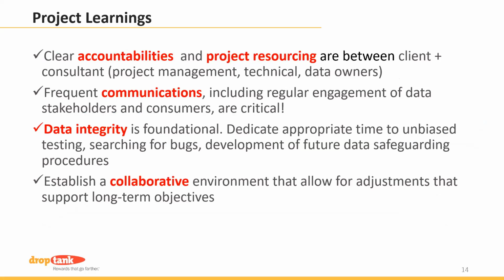Project learnings, again, it wasn't all smooth. There were some hiccups along the way. When I just reflect and give you my honest feedback here, here's some things that jump out at me as something that's critical. Clear accountabilities, project resourcing. We did not have a technical resource in place at DropTank. We just hired a data engineer in February who's been fabulous. Well, the first 8 to 10 months of our project, we did not have that data engineer, and we were competing with other projects that were going on, other priorities, so it made it a little difficult.